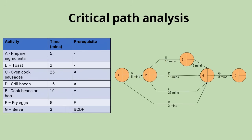We start with a node labeled number one. There are no prerequisites for preparing the ingredients and doing the toast, so we can have these two activities simultaneously coming out of node one. The sausages, the bacon, and the beans — activities C, D, and E — all have the preparation of the ingredients as a prerequisite, so we put our second node here with activities C, D, and E coming out of it at the same time.